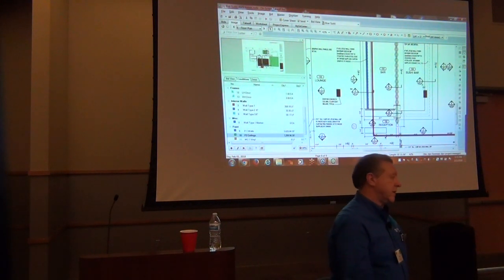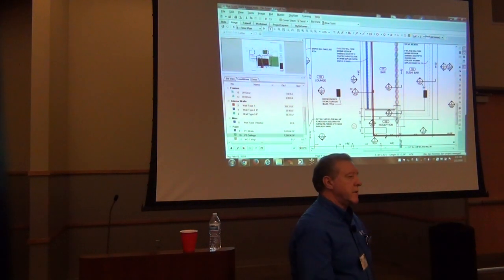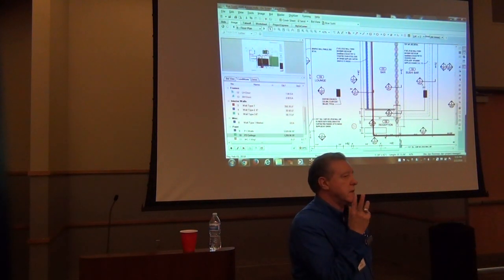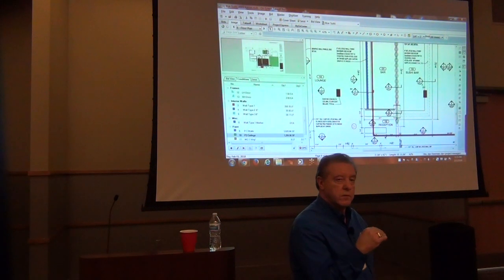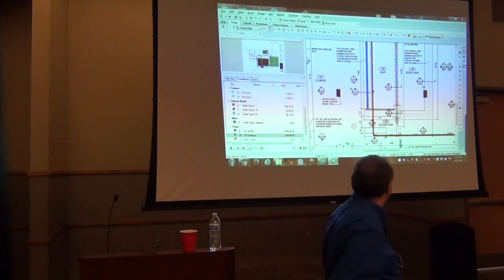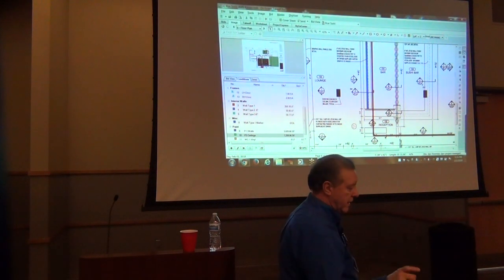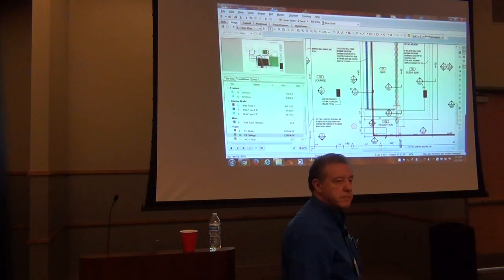It's called multi-object takeoff. How many of you have used that? Okay, that's one that's been in the program for a while, but it tends to get overlooked or possibly unknown. You hold down the Control key, highlight the 3 or 4, however many conditions you want. One activity gets you multiple objects.